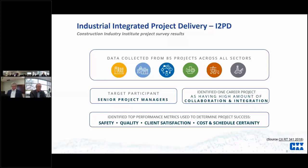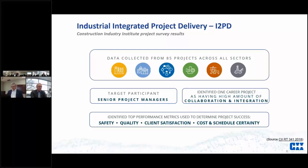We followed the survey up with 20 case studies and deep in-person interviews to gather more data, to begin the analysis process to see what it was about collaborative contracting or alliancing that may have been a barrier for industrial projects. What elements of IPD and alliancing were they using in their most collaborative contracts? Were they successful or not? We identified 14 top performance metrics, with the top KPIs being safety, quality, client satisfaction, and cost and schedule certainty.